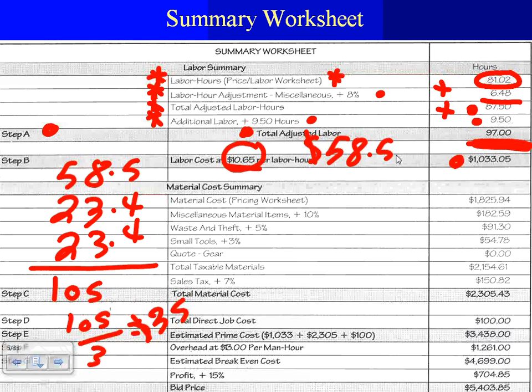Well, I'm going to talk about it later, but there again, shop average: take your people who are working for you, multiply by how much you are paying them, divided by their number. That's shop average. Job average: you are working on a project, multiple projects, right? Keep track of all the hours of every electrician in your job. That's easy. And the expense for them, right? It's easy. Divide the expenses that you paid for your electricians by the number of the electricians. That will give you how much, by of course, how many hours they worked and so forth. Then you come up with a value, $1 per hour for your crew, one person of your crew.